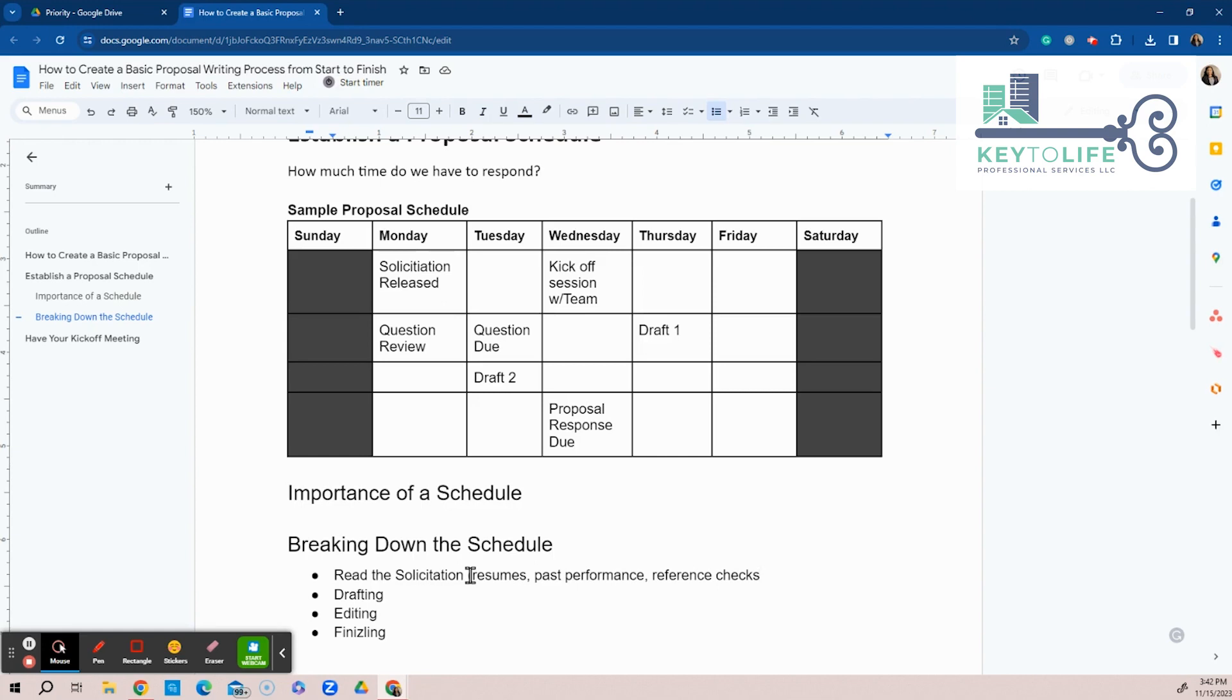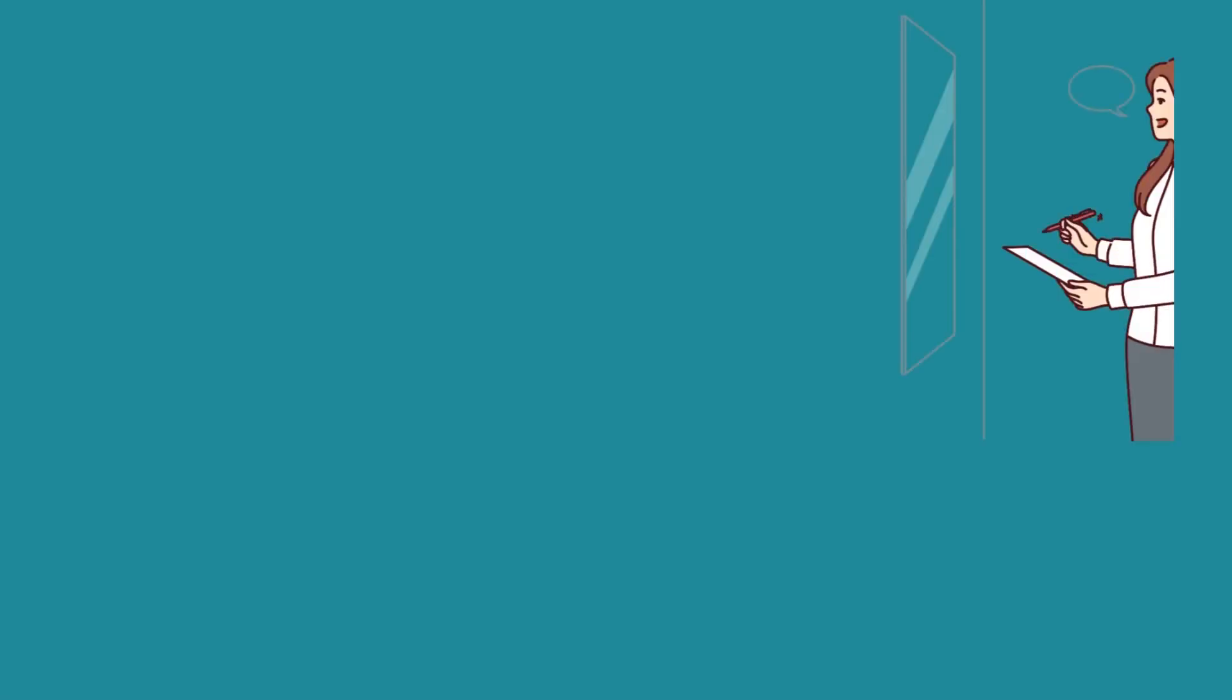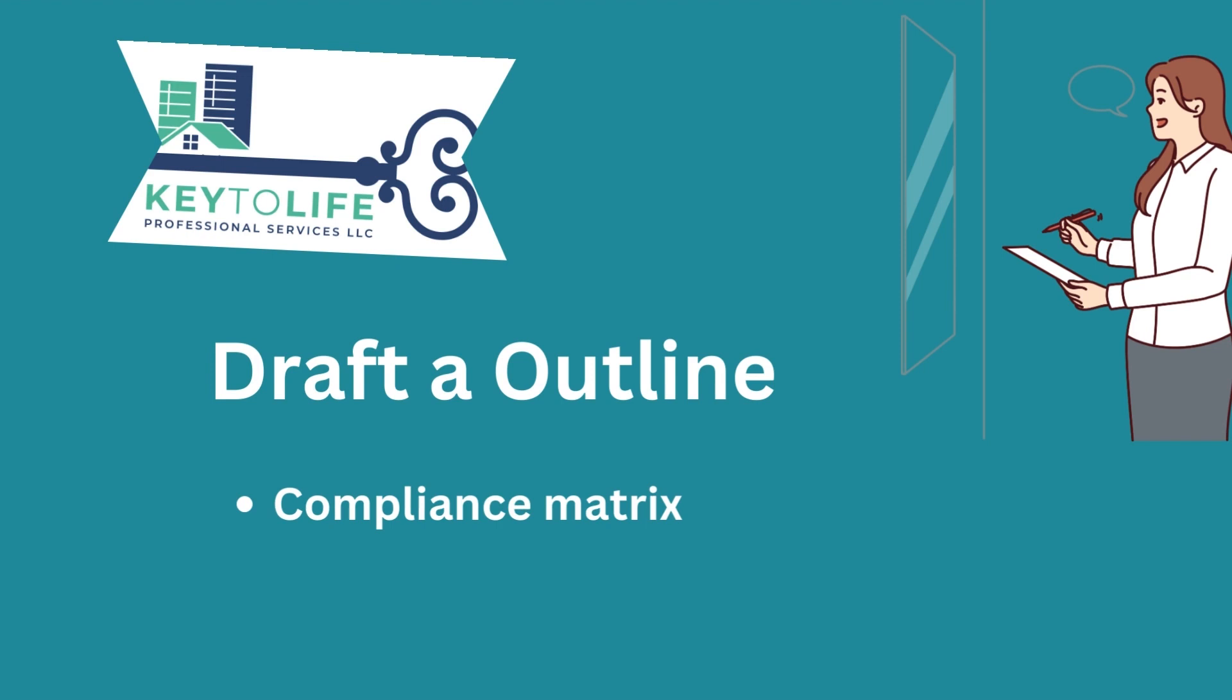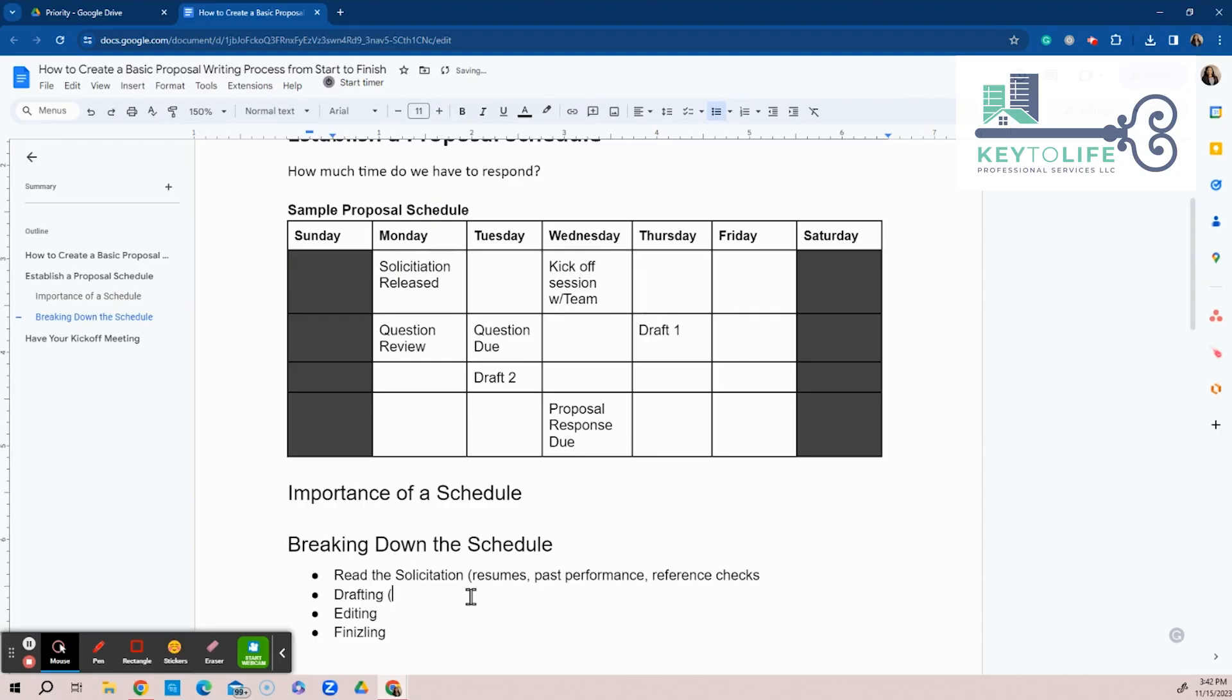So then also now you have to draft your outline, you might have to do a compliance matrix. I always recommend doing a compliance matrix so you can see what we have and what we don't have. Then I also recommend you do a bid decision. So we know we got to do a bid decision.